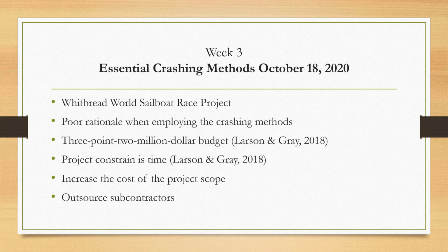Again, based on the data submitted by the project team members, the project duration and the crash cost exceeds the time and cost creation criterion under the project's priority metrics. Although the crash time alleviates some of the time denoted under the normal time, it is still not enough to complete the project within 45 weeks before the new vessel leaves for the United Kingdom start race.